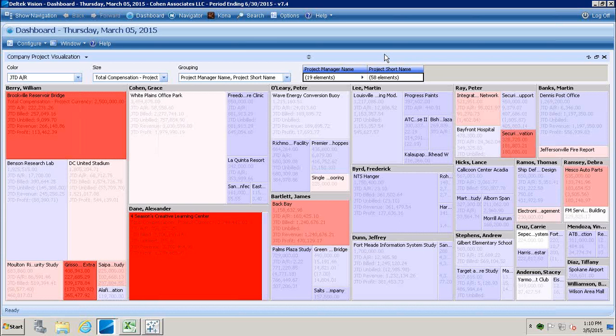The red, we can be over budget on this, and of course that's a risk for your organization. We could also have a bright blue here, and that would mean that we're underutilized. That could be another risk that we might not be able to deliver to the client on time because the staff that we're putting on this job is getting pulled in a lot of different directions. So once again, visualization, having that red box jump out at us, being able to very quickly identify risks and being able to identify what needs our attention.